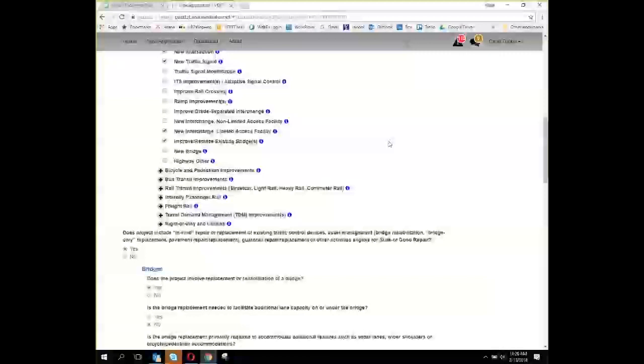You'll notice the pre-application doesn't have anything about cost estimates or schedules, because that tends to take a little while to develop if you're working with the district or with DRPT to get that reviewed and get feedback on it. So that wouldn't be required in the pre-application, but would be one of the things you would be filling out during the full application. Okay. Thank you very much.